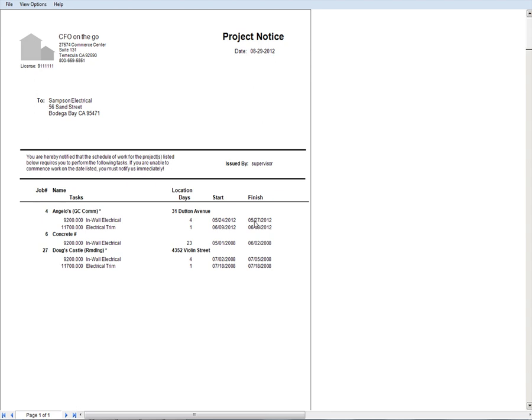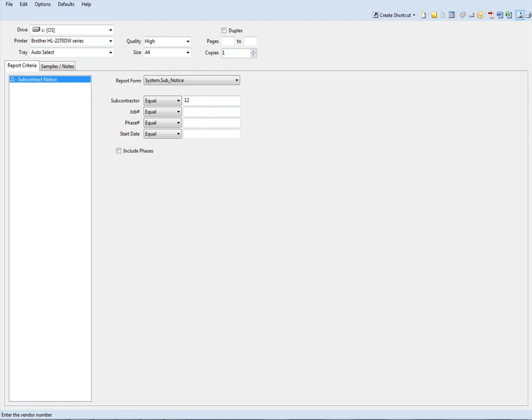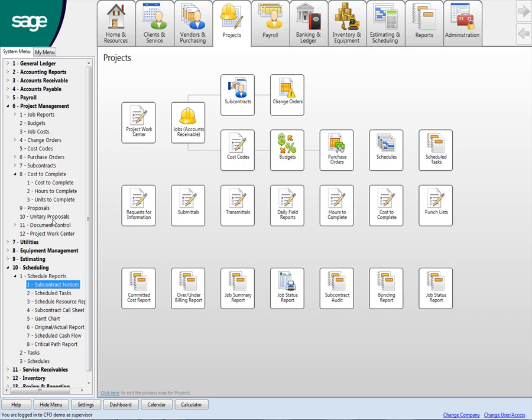And so typically what our homebuilders, especially custom guys, or GCs will do is they'll do this on Friday around lunchtime. They'll get their schedule updated from what's happened in the field for the week. They'll produce their new schedule, they'll produce these project notices and then send them out to their subs. So that's one way of doing it. I've seen most people do it actually that way.